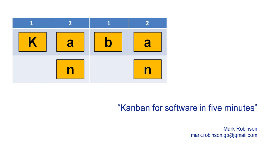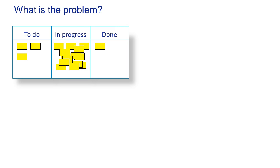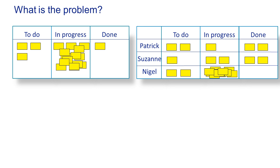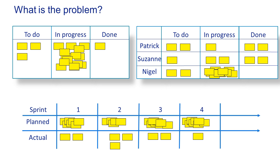I'll start by explaining what the problem was to solve. Our team had a lot of work in progress and very little was getting through to done. If you've got a lot of work in progress, the average time to complete each task will only increase. This could be for the whole team, or sometimes there were specific individuals that were causing the bottleneck. The result was that while we promised a lot for each sprint, we actually delivered a lot less.